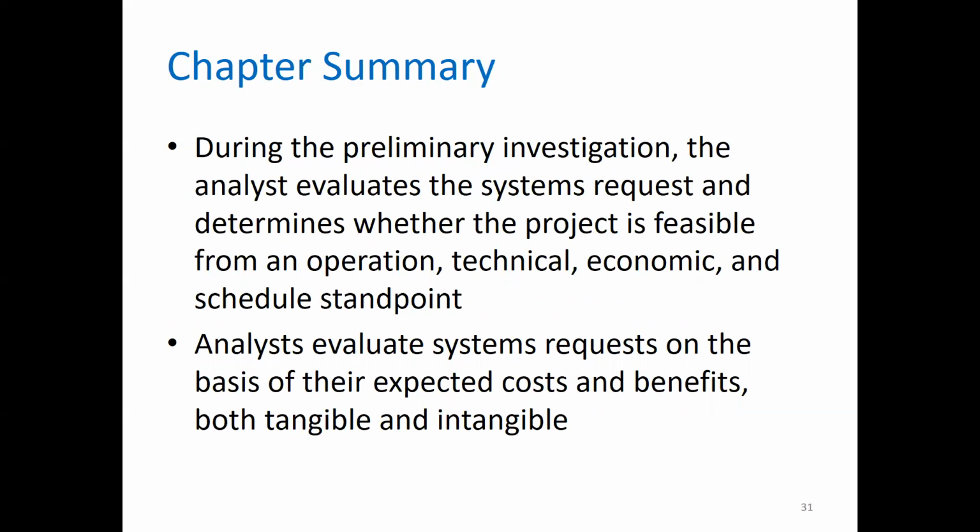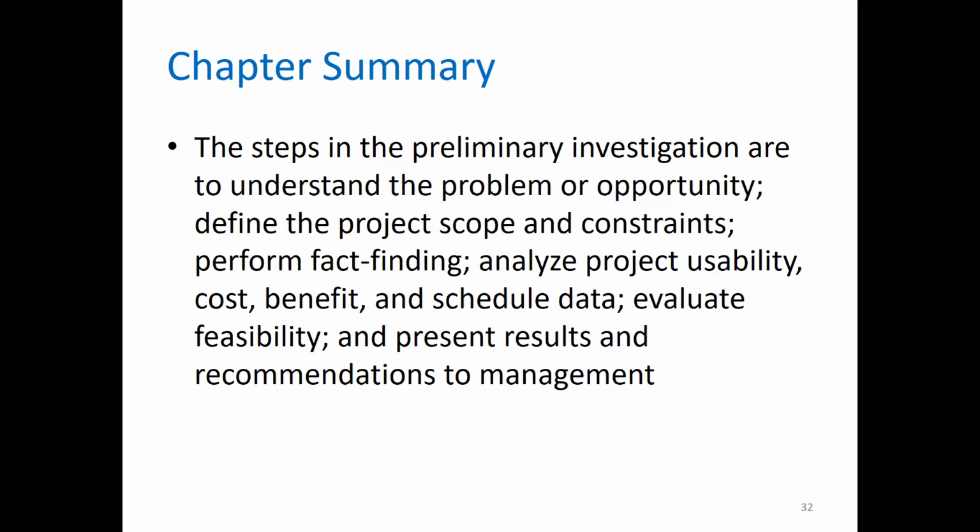Analysts evaluate systems requests on the basis of the expected costs and benefits, both tangible and intangible. The steps in the preliminary investigation are to understand the problem or opportunity, define the project scope and constraints, perform fact-finding, analyze project usability, cost, benefit, and schedule data, evaluate feasibility, and present results and recommendations to the management.